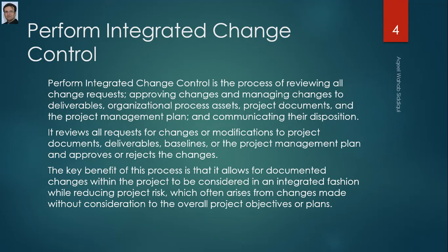It reviews all requests for changes or modifications to project documents, deliverables, baselines, or the project management plan, and approves or rejects the changes. The key benefit of this process is that it allows for documented changes within the project to be considered in an integrated fashion while reducing project risk, which often arises from changes made without consideration to the overall project objectives or plans.